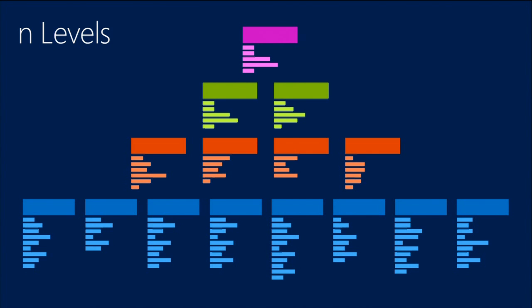But they're a larger granularity of item that it's really a chunk of value meaningful to the customer. And then epics are completed by stories. And stories are essentially chunks of value worked on by the team. And the team can break that down to any granularity that's interesting to them, while the level just above stories is the chunk of value meaningful to the customer. So that might be a common thing.